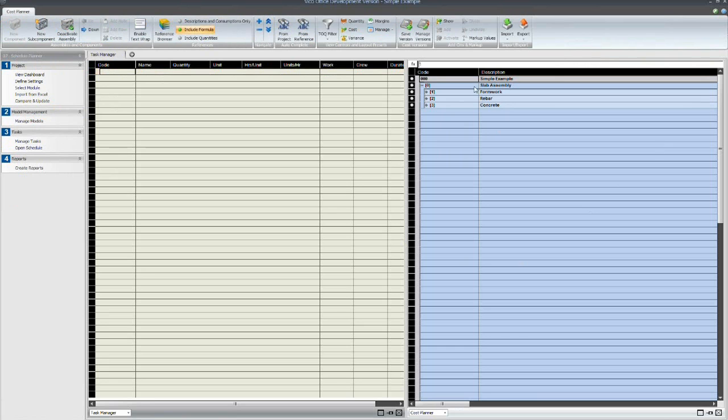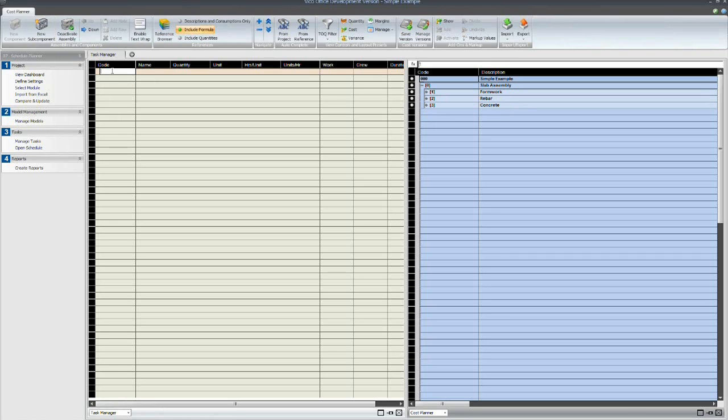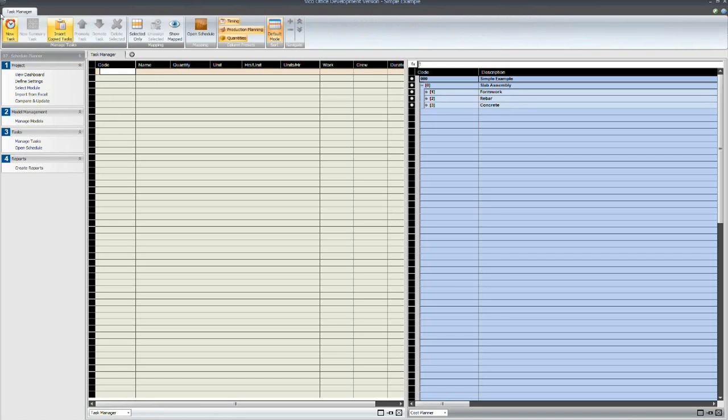And on the right-hand side, I've got my cost plan which I've just been looking at and I'll create my tasks and then we'll allocate the cost plan item.